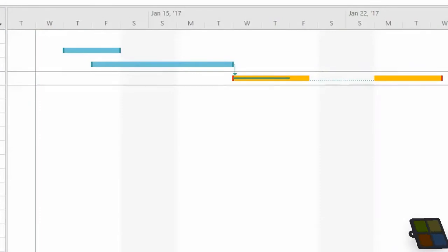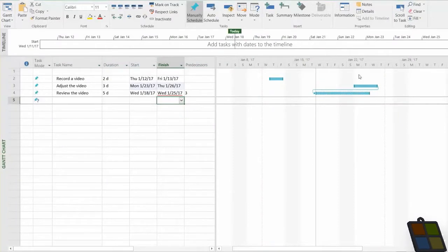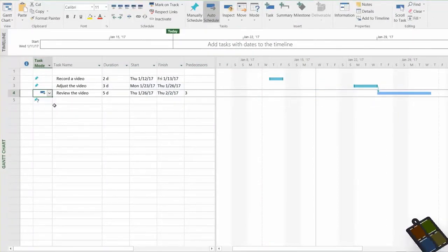In the Gantt chart, all links are indicated through arrows indicating the type of dependence. By default, you create Finish to Start links, which means that the following task must not start until the preceding one, or predecessor, is finished. These links are quite useful since Project will automatically organize your tasks in order to respect this dependence.